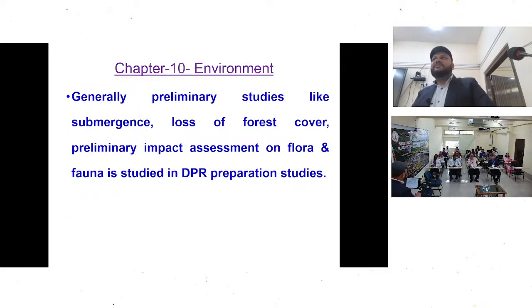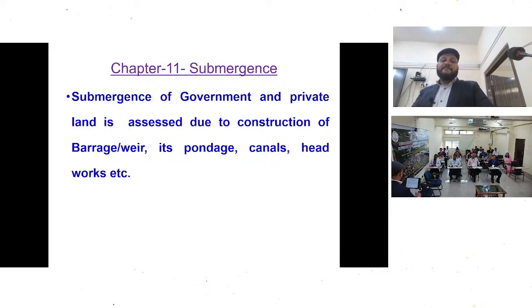And environment is very important and critical as of now, because lots of acts have been passed and we have to do EIA studies, environmental impact assessment studies. This chapter is a must, and forest clearance is also required for any project.